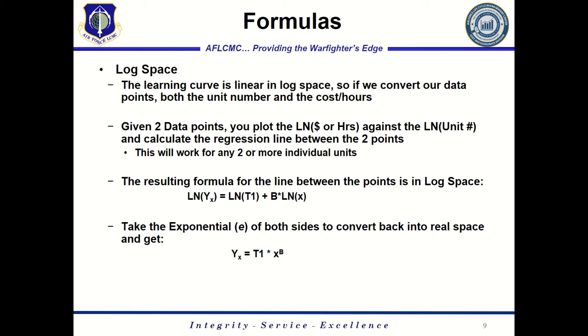We want to figure out what's the algebraic midpoint of that lot. We don't use just the middle, the average or the middle point of the lot. We use an algebraic form of calculating that, since we're comparing the cost, which is decreasing at a rate. So we want to get the algebraic midpoint as opposed to just the average.